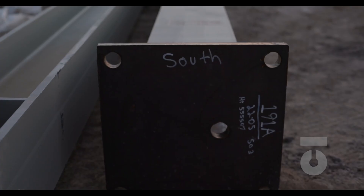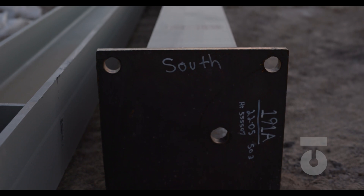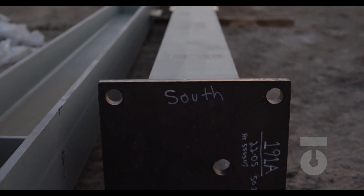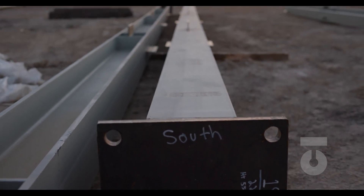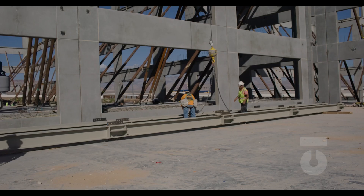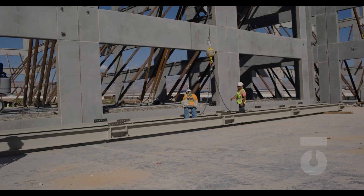With an organized load list that is properly sequenced according to our erection schedule, we have steel brought in correctly. In the case of our office building, we would start with the columns that need to be loaded in, rigged, then installed.